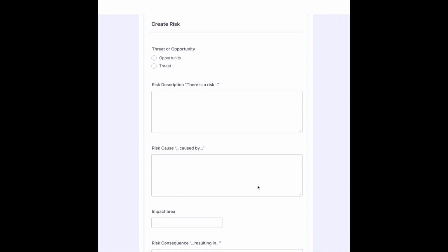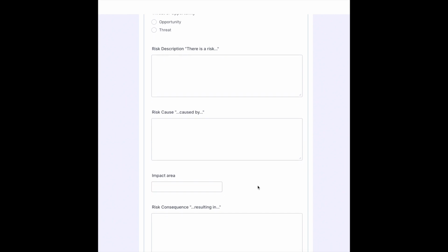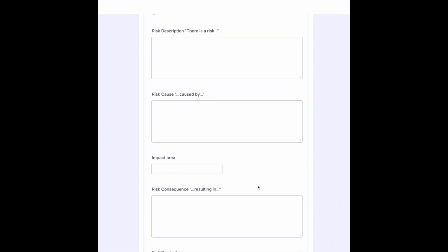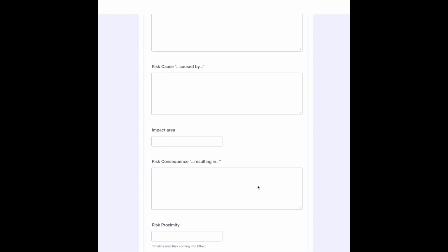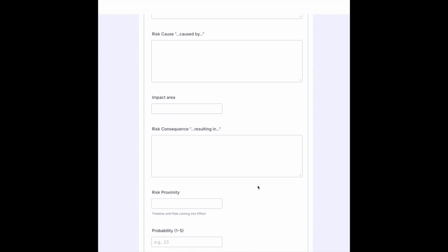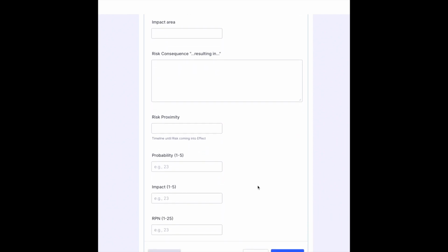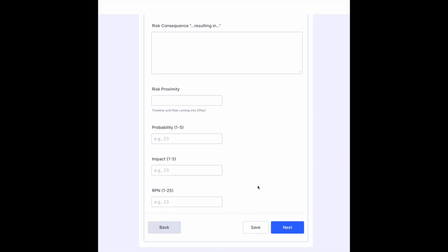So instead, we opted to go with building a form that had all the necessary inputs and a detailed description underneath to allow anyone entering a risk to know exactly what to add. We then linked this form directly to the table, so there would be no manual data transfer, and this reduces mistakes made, but also the time taken to add risks to the table for analysis.